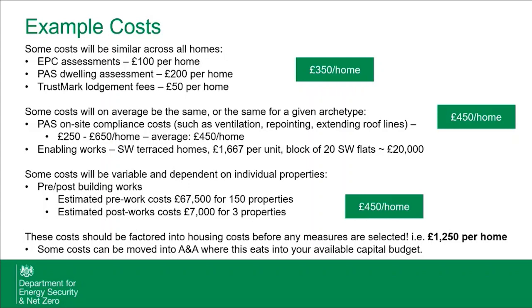No, so you could log it as an additional. You could either log it as upfront money, because you're technically agreeing to spend it before you've started the works on the home. You could also log the second one as additional capital, I guess, because it's a static cost. So the cost of actually doing the EPC will be the same for both.